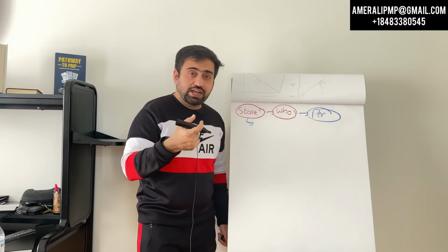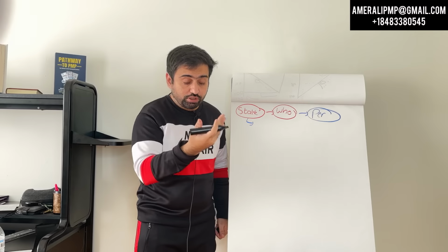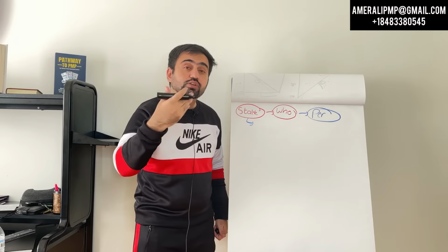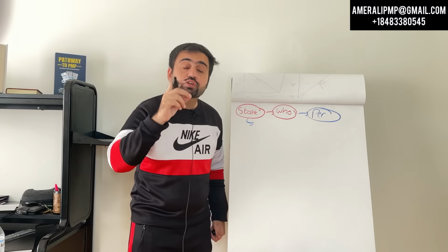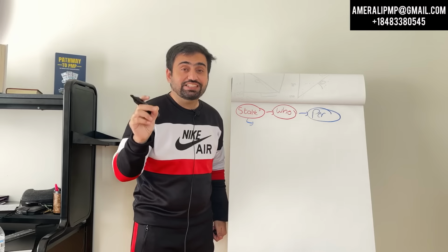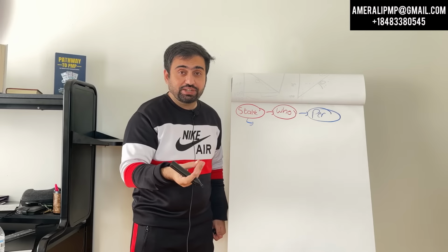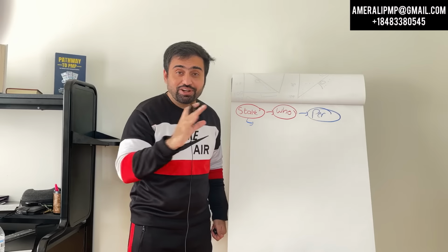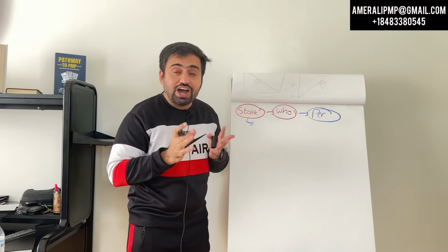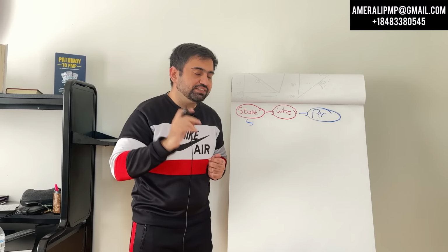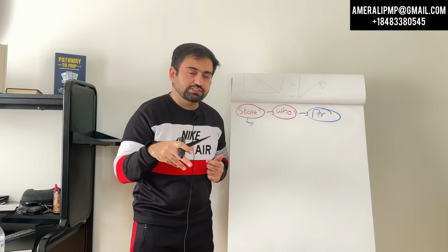The first thing, as the project charter gets approved, you review the project charter, you look, okay, now the project is ready, you start working on it. You will go and identify key stakeholders. You will share with them what their responsibilities are. That is how important this topic is. Like the first thing after reviewing the charter is having a meeting with them. So let's go back and see how we identify the stakeholders.